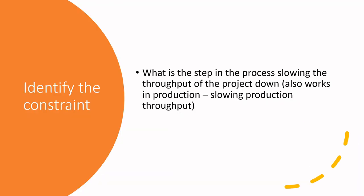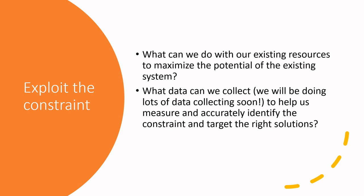Let's recap what we just did. We identified the step in our process that slowed the project down — in the mochi ice cream case, based on our CPM mapping, it was ordering our supplies from our ingredient supplier and the long duration it took to get those supplies to us. The next piece of the puzzle is: how do we exploit that constraint? What can we do with existing resources to maximize the potential of the existing system?